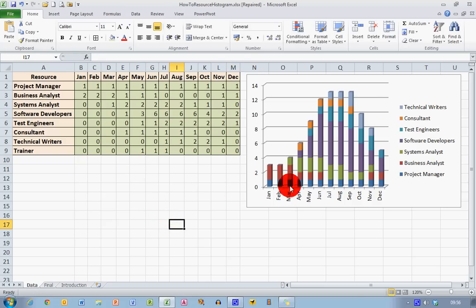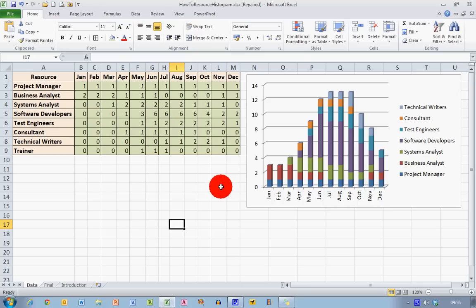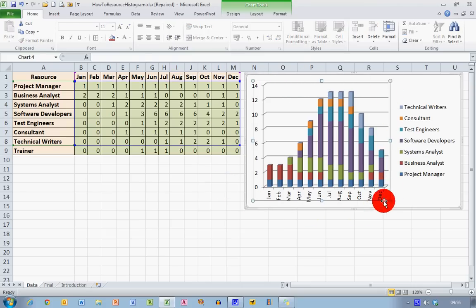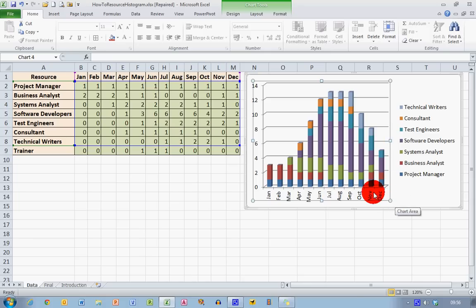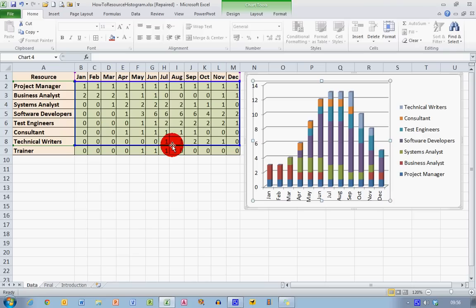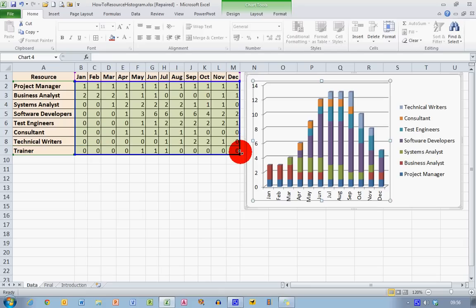Now this has not updated to the resource histogram over here. But it's quite simple to include it. So just select the table here. Make sure it's selected with the selected box around the chart in the centre here. And then if you look carefully over at your table of data on the left hand side, you can see a blue bar in my case. It might be a different colour in your Excel. A blue bar around the existing data. And if I just move to the corner of that and drag it down one more line to include the data for trainer.